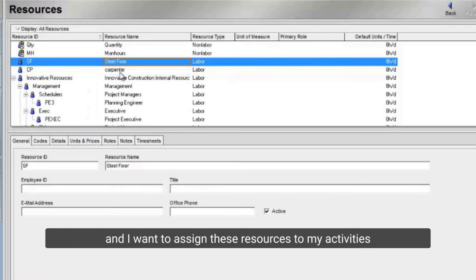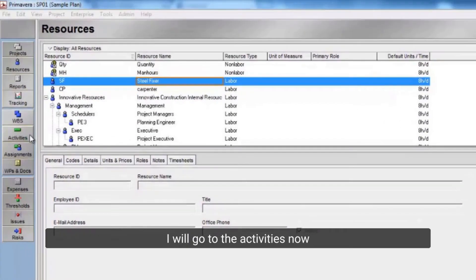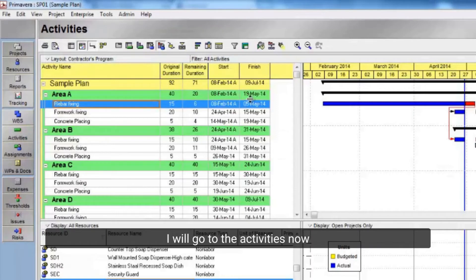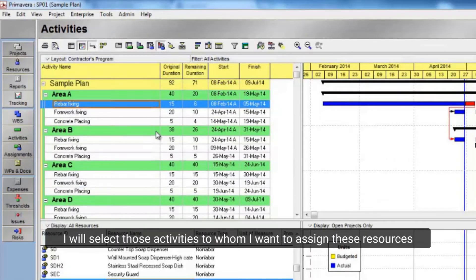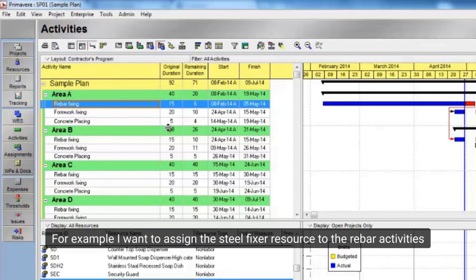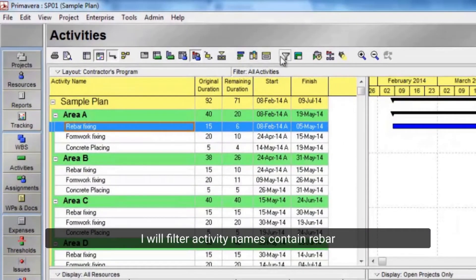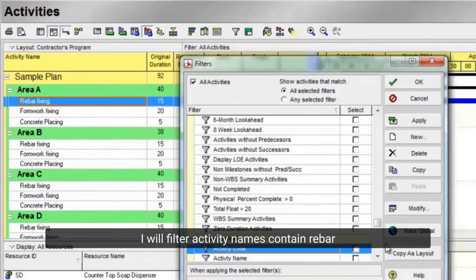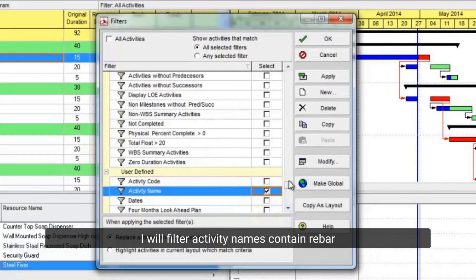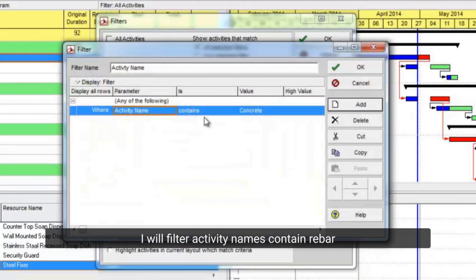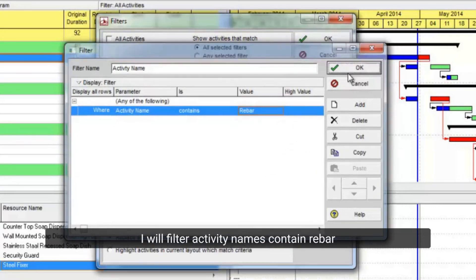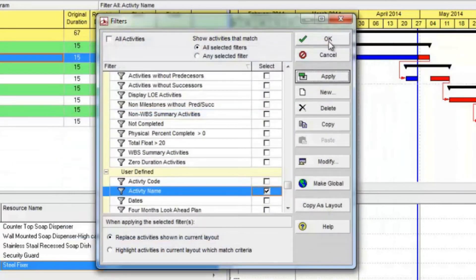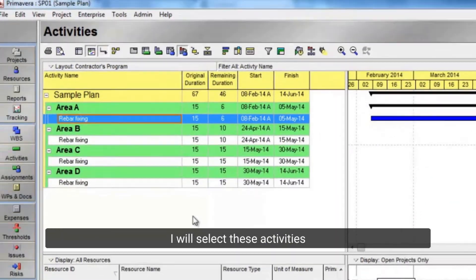I will go to the activities now. I will select those activities to whom I want to assign these resources. For example, I want to assign the SteelFixer resource to the rebar activities. I will filter activity names containing rebar. I will select these activities.